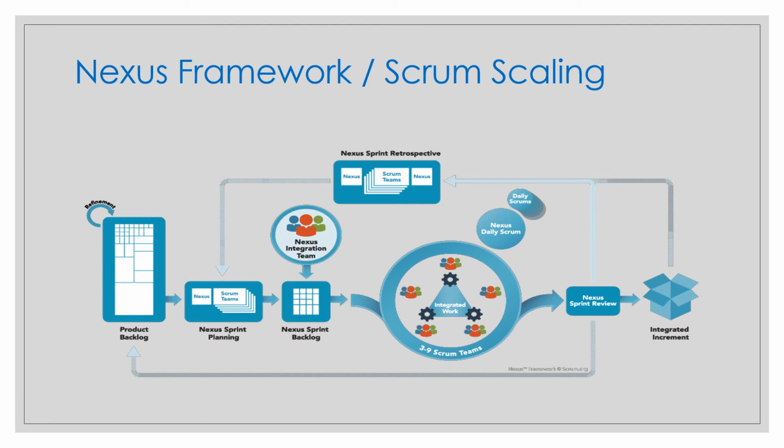This process is a bit easier to manage, especially in organizations where teams have different sprint lengths, so the sprints are not aligned. So please remember, there is no integration sprint or hardening sprint in Scrum when multiple Scrum teams work on the same product.